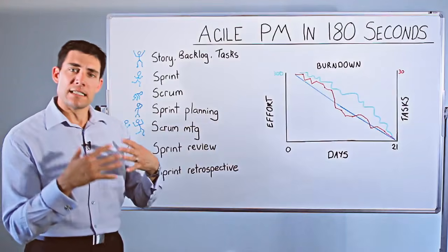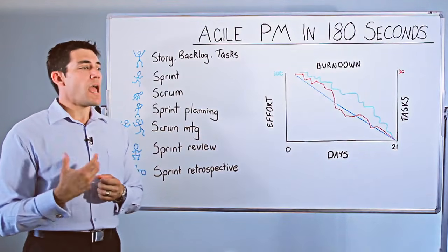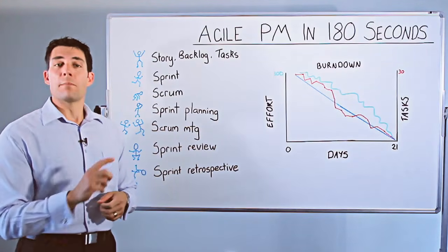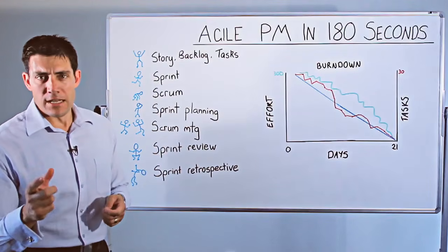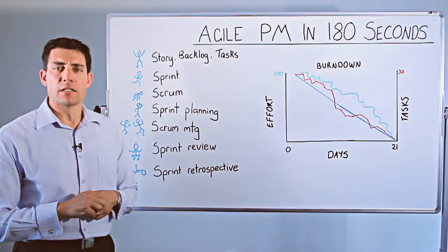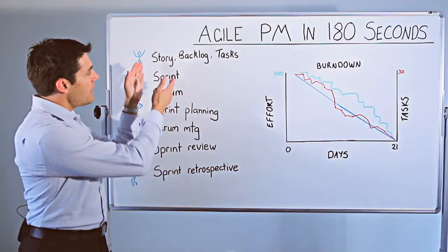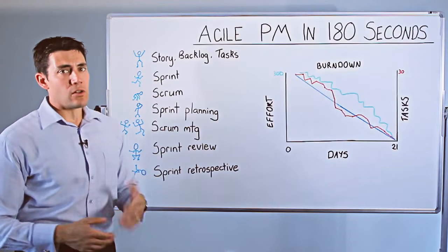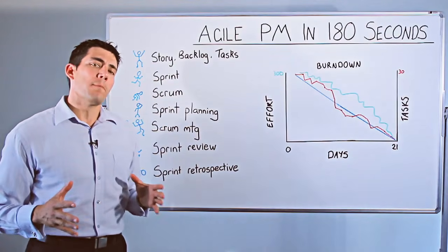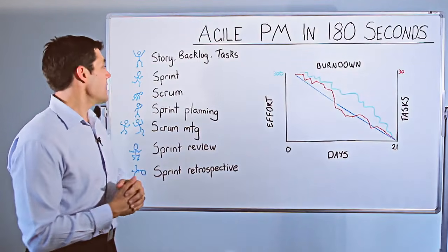Now, the backlog is a set of requirements that go into filling up that story. So you might say a user in Idaho can access your website. Okay, that's a requirement. Or they can pay with a credit card, a Visa card, or MasterCard, or their own personal banking card, or do a fast check, a direct deposit to pay for that. That's part of your backlog. The list of requirements that comprise your story is what's called your backlog. Now, your project team, when they get together, they look at that backlog, then decompose the requirements into different tasks. And those are quite simply tasks, so that's easy enough.